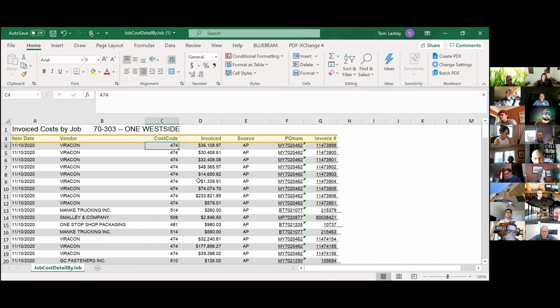Because a lot of GCs require invoices, you can't guess at what you're going to receive, or the exact invoice amount. So on the 10th, we're cutting it off, and we're creating this standard process. We're hoping this allows AR and our billing department to get better at this, and we can start moving our billings. Instead of doing them on the 10th, we can move them to the 15th, and we get to bill another 5 days of invoices.